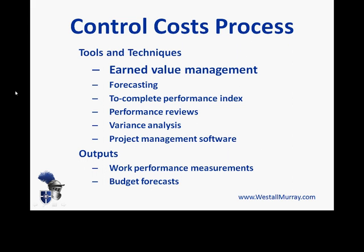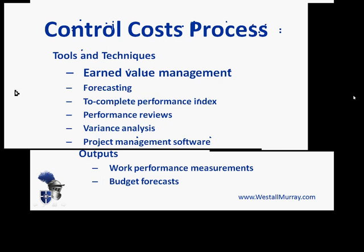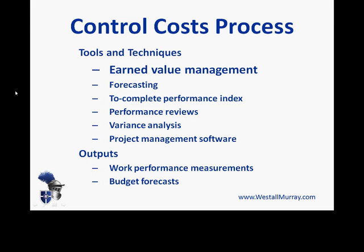So let's look at that Control Costs process. Of the tools and techniques within that process, Earned Value Management is the first one listed, but more importantly, it also feeds into, or is associated with, every one of the other tools and techniques there as well. For example, one of our primary tools for forecasting is Earned Value Management, and we certainly need it to calculate our to-complete performance index. We get our Earned Value data through Performance Reviews, and we use Earned Value Management to calculate variance analysis. Our Project Management software will also help us with Earned Value data.